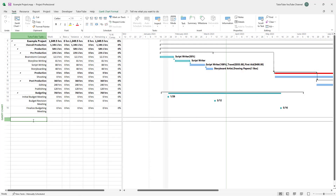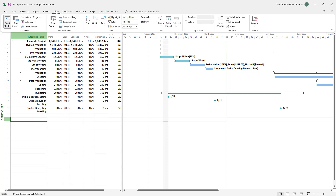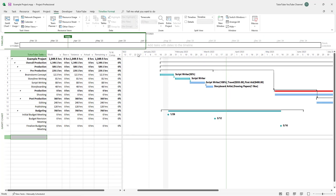If you want to keep track of things visually, one of the things you can use is the timeline. To do that, go over to the View section, and you can see that timeline is an option. If you enable the timeline, you can see it appear at the top.